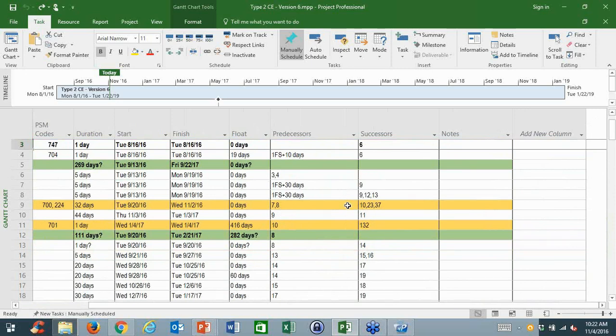We wanted to make sure that decisions made in the middle of the PD&E, as I mentioned, changes in delay and right-of-way cost estimates. We wanted to develop these relationships so you can see how changes in something like this can impact your production date. For example, if you know if your SEIR approval date is so-and-so, but there's a delay in the public hearing, we have defined successors and predecessors for almost every activity, so we can have that relationship.